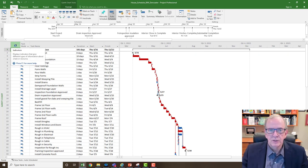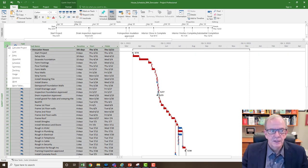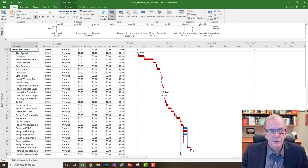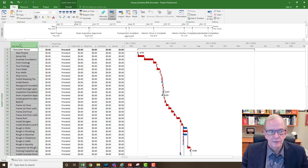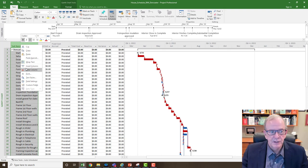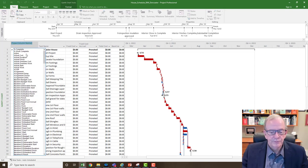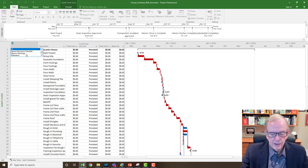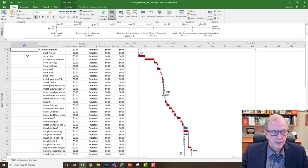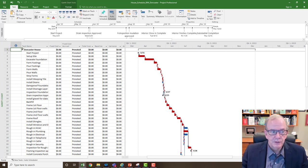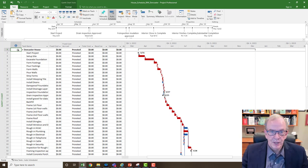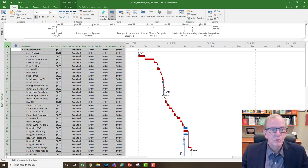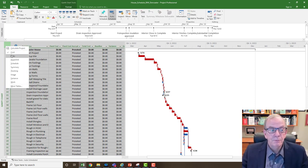So you could insert this on any of your various screens. For example, if I right click here and I go insert column, again indicator, and there it is. And I find the indicator column is really helpful because it will show you if you've got constraints, special calendars, and it will show you if you have hyperlinks.